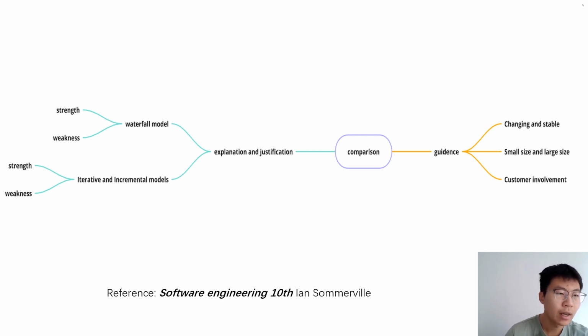The next, large software systems that are part of broad engineering systems developed by several partner companies. Where several companies are involved, complete specifications may be needed to allow for independent development of different subsystems. In a word, the waterfall model is not useful for informal team communication and rapidly changing software requirements.